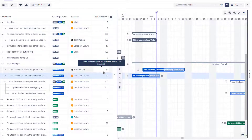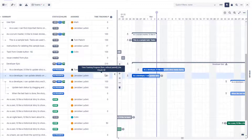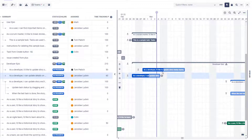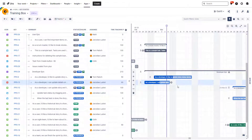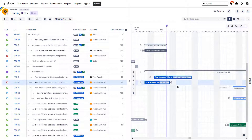That corresponds to the percentage of completion that you will see over here. I have a time tracking field enabled — I have 50% here and 60% here — so you can see that the darker section ends a little bit after the halfway point of the task. When you enable this, it gives you a very good indicator of what the progress of your task is compared to what it should be according to how much time has already passed since the task started.